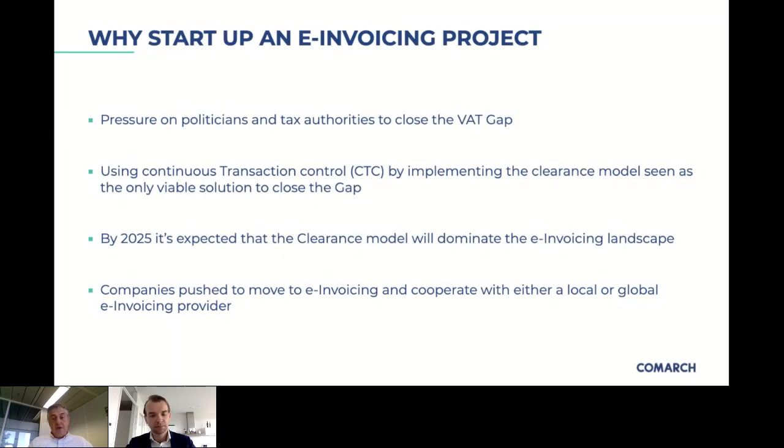And that project team made up an RFP in which we explained the complexity of our company, also in terms of systems that we are using. That RFP was sent out to different suppliers, and those suppliers had the opportunity first to present their solution. Based on that first presentation, internally we made a short list of 3 vendors, and those vendors had the opportunity to give a more detailed presentation, including a demo on their solution for e-invoicing within our company.